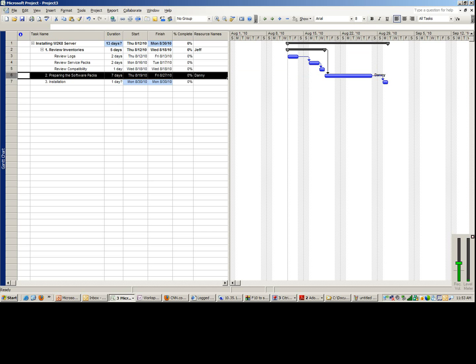Okay, so automatically it computed 5 days because 2 plus 2 plus 1 equals 5 days. So you can have multiple people doing this. This could be Jeff, this could be Abbott, this could be Curly. Okay, so how's that? 10%, 20%, 30%, and that's all there is to it. This is how a project manager shows the project sponsor and the user community what the current project tasks are, who's supposed to do what, when it should be completed, and how much we've completed by this time.